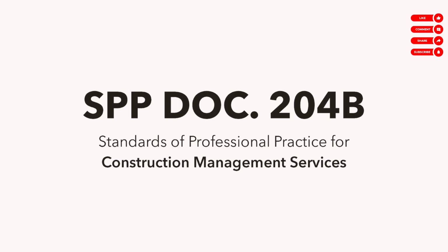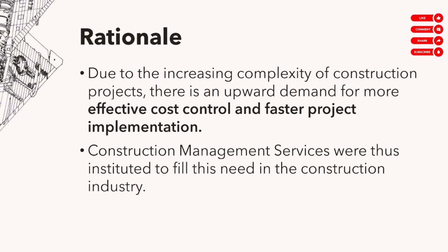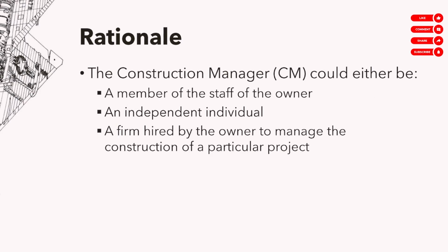Alright, so let's talk about the construction management service. Still something that's rendered during the construction phase, parang full-time supervision, but this is a bit different. This is parang a step beyond supervision. Medyo mas maraming trabaho to. Okay? One thing rational is always, projects today are very complex. No? Clients are very demanding when it comes to cost control and faster implementation of the project. So clients want it to be done quickly and to be done within the budget. That's the reason for the construction management service, because the construction management service is intended to respond to this need: cost control and faster implementation.